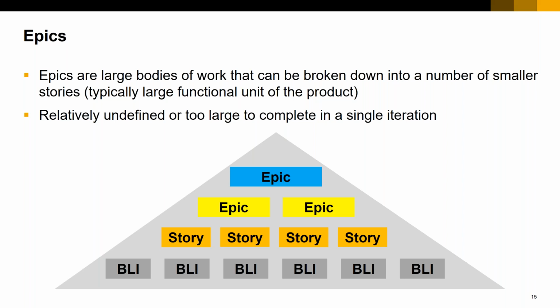Relatively, these are undefined at a very high level, and too large to complete in a single iteration, right? These epics are not something that can be taken by one team or one person and done in a specific amount of time. So it is typically relatively undefined and too large to accommodate within a sprint, for example. So epics is the first building block that you would start from.